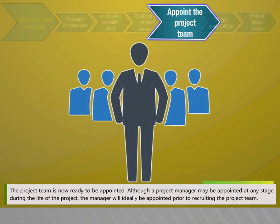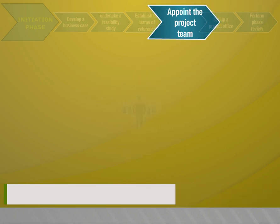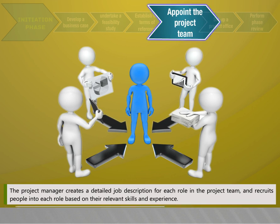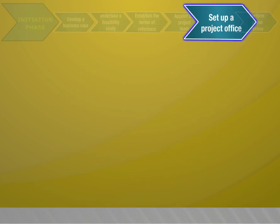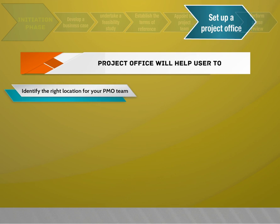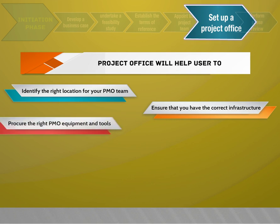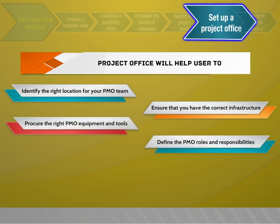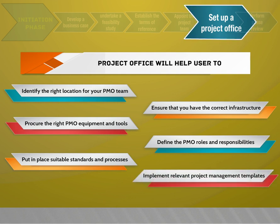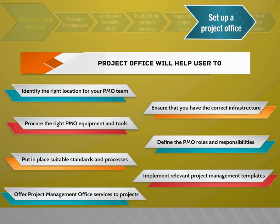The project team is now ready to be appointed. The project manager creates a detailed job description for each role in the project team and recruits people based on their relevant skills and experience. Setting up the project office includes identifying the right location for the PMO team, ensuring the correct infrastructure, procuring the right PMO equipment and tools, defining PMO roles and responsibilities, implementing relevant project management templates, and offering project management office services to projects.